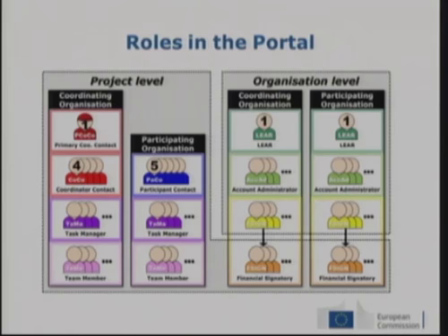When you submit, then the project officer, again in the Commission, will check this information, and then either they accept and you have finalized the session, or they reject, and then we have to start again, and you have to change the data, update it, and give more information if that's what the PO tells you to do. So this is valid for negotiations and for amendments, and I think it's also for project reporting. So it's the same mechanism all the time.